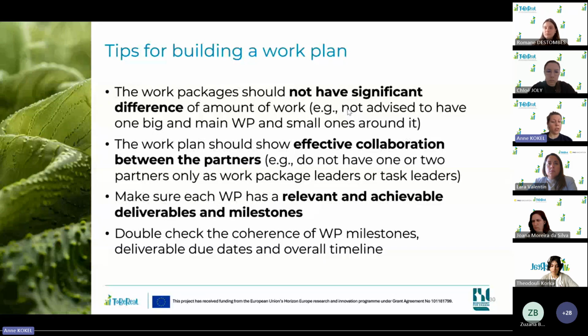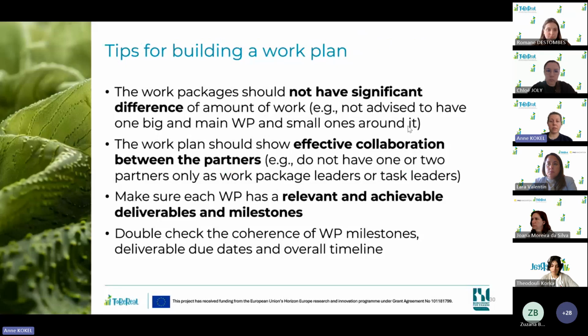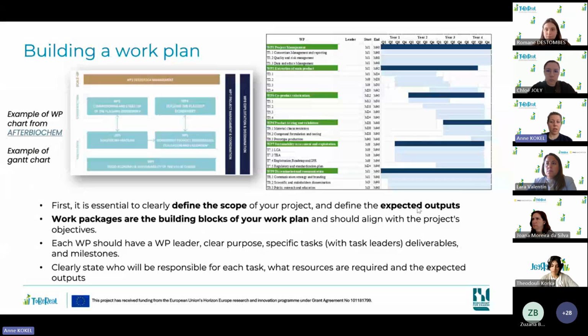And then last, double check the coherence of your work package milestones, the deliverable due dates, and the overall timeline. And that's why, you do not need to, but it's better to build a Gantt chart to make sure that everything is logical also in terms of the timing.